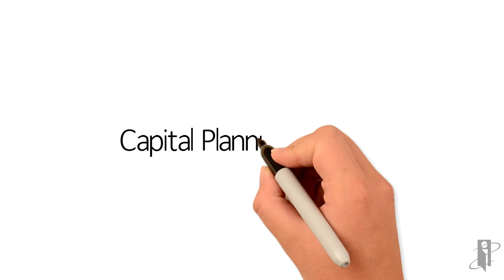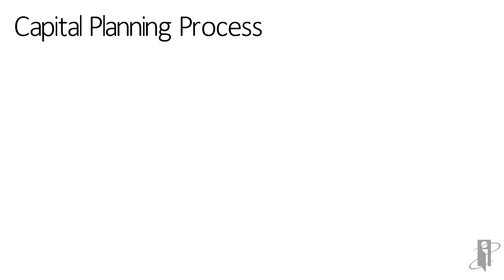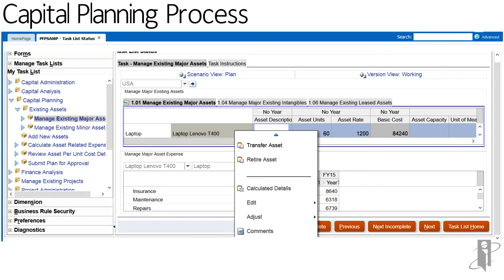PFP includes the capital planning module. You can tie in your assets to your projects and manage how expenses are pulled in by project. You have full functionality to manage and forecast your assets: loading in actuals for existing assets, transferring them, retiring assets, and calculating the appropriate expenses based on those changes. You can add and request new assets and approve those, and because this is within PFP, you can tie that directly into projects.